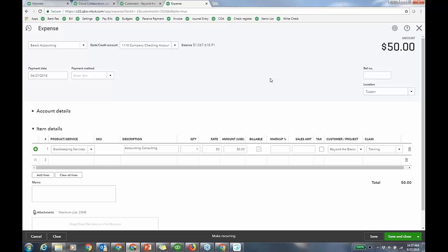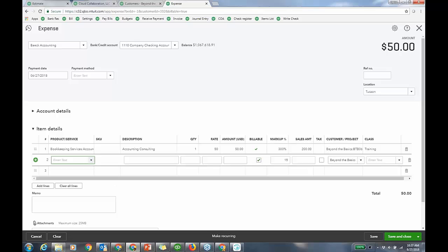So my argument is in the design of the project functionality, you wouldn't need to make it billable, right? But I'm going to keep it billable just because of pass-through time expense and stuff. But there's two theories here with job costing, I think, and you probably agree. You're either passing it through to an invoice, you know, unbilled activity you assign to a job, or in my case, job meaning customer, sub-customer, project, or you're looking at profitability of, or both, right? So it doesn't always have to be billable. I'm going to make it billable, but it doesn't have to be.